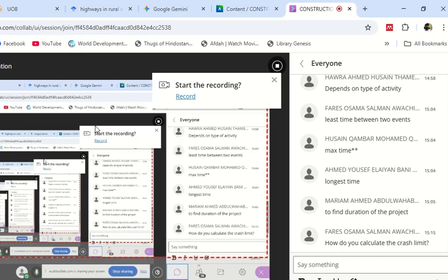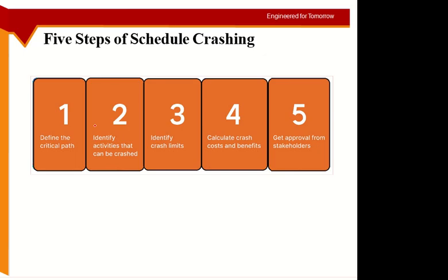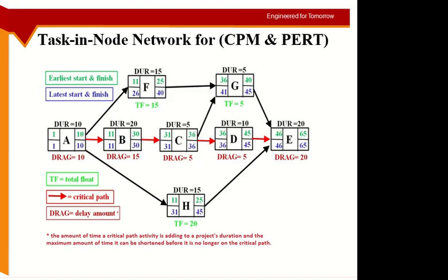Can I compress the remaining 7 days? No, because that is for the strength gain of the concrete. Okay, so this is where you need to look at the type of activity and all these things. This is an example which I showed you in the last lecture as well, and we already did the calculation for that.